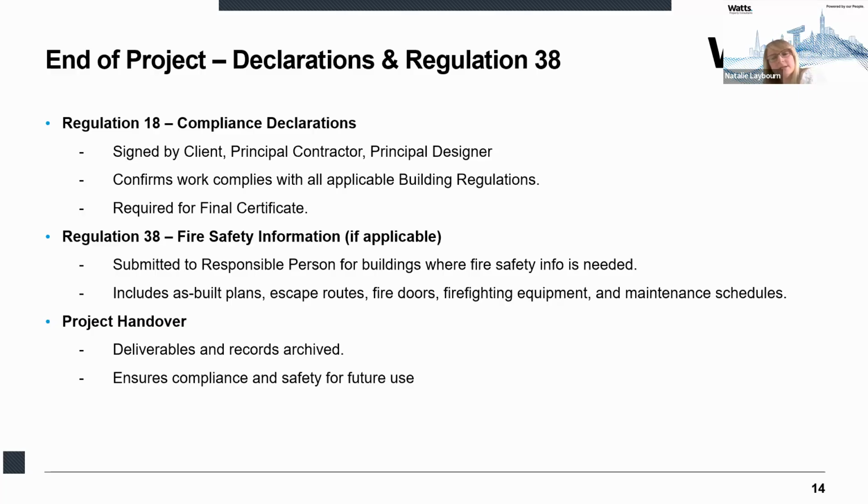Where Regulation 38 is applicable, the Building Regulations 2010 mandate that upon completion of building work, the person carrying out the work must provide comprehensive fire safety information to the responsible person, so typically the building owner, landlord or occupier. This information is crucial for the responsible person to manage and maintain fire safety within the building effectively.